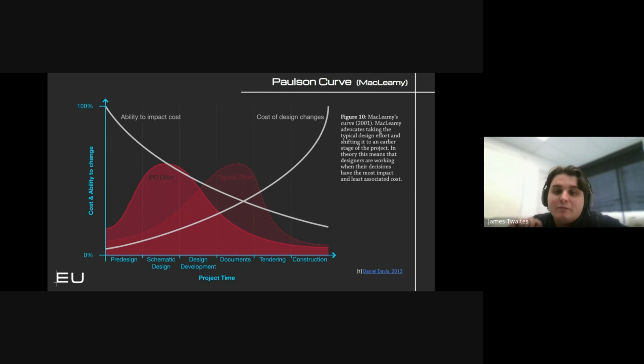It's the same reason that Etro values pre-construction and estimating. And it's an illustration of the simple truth that the later you are in a project, the more expensive it is to make changes. In other words, the sooner you're aware of an issue, the cheaper and easier it is to solve it. This is true for individual activities, for project phases, and for the project as a whole. Typically, most changes can't be anticipated, so by the time they get to us, all we can do is mitigate the impact on budget and schedule as best we can.